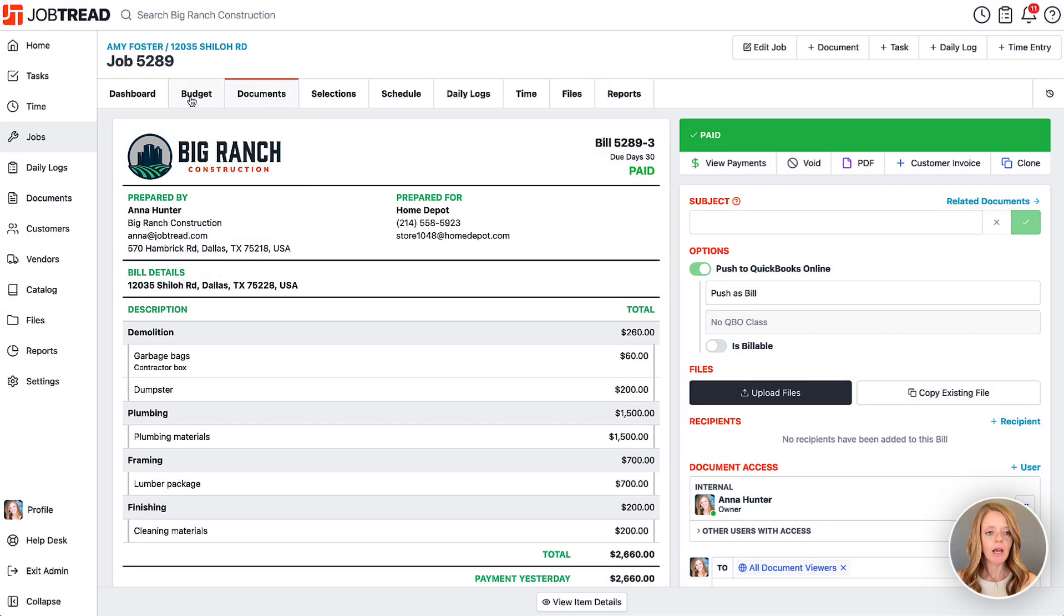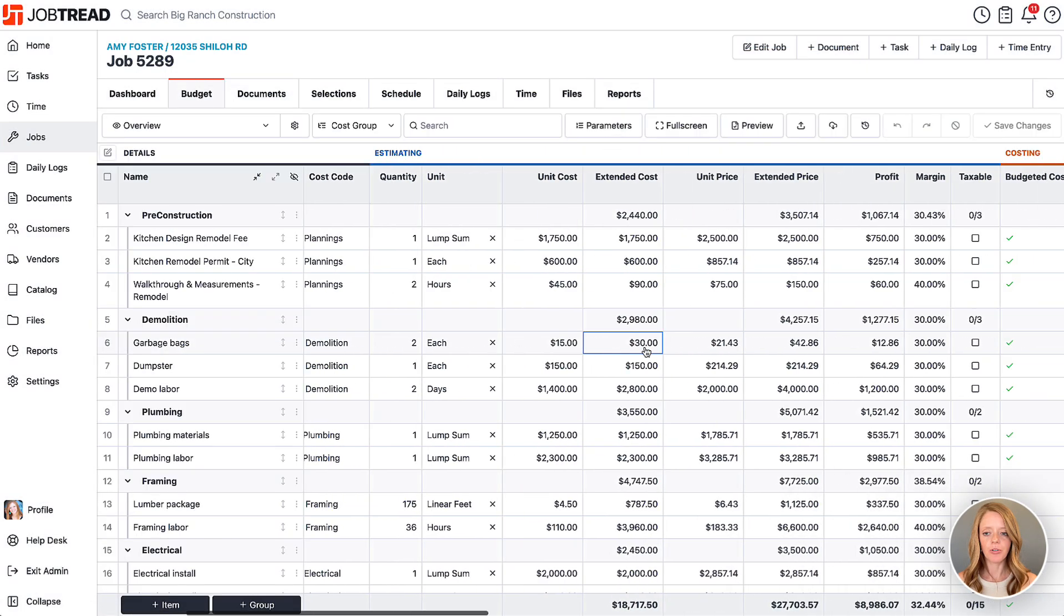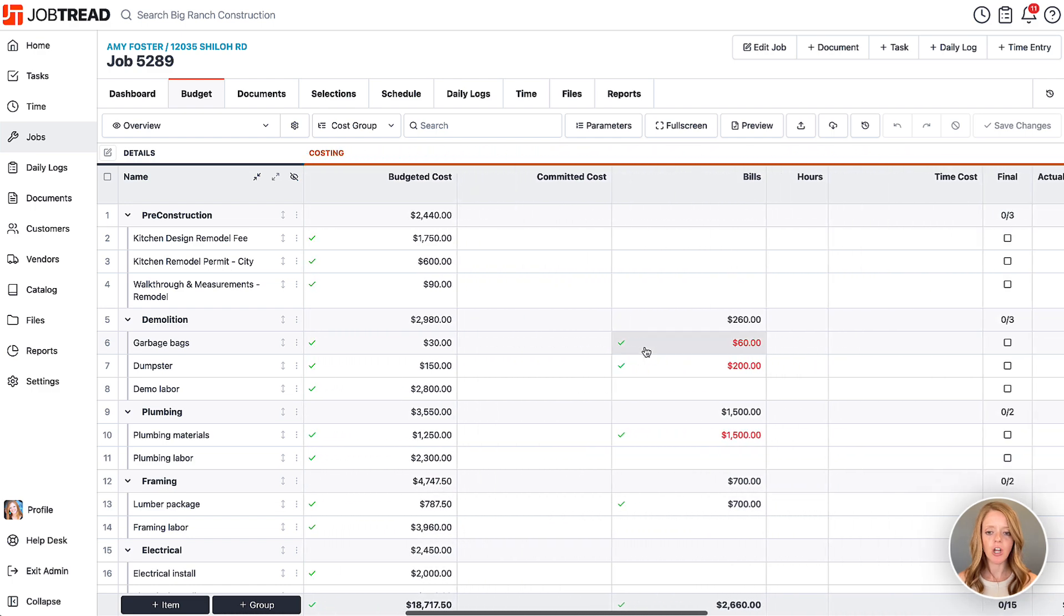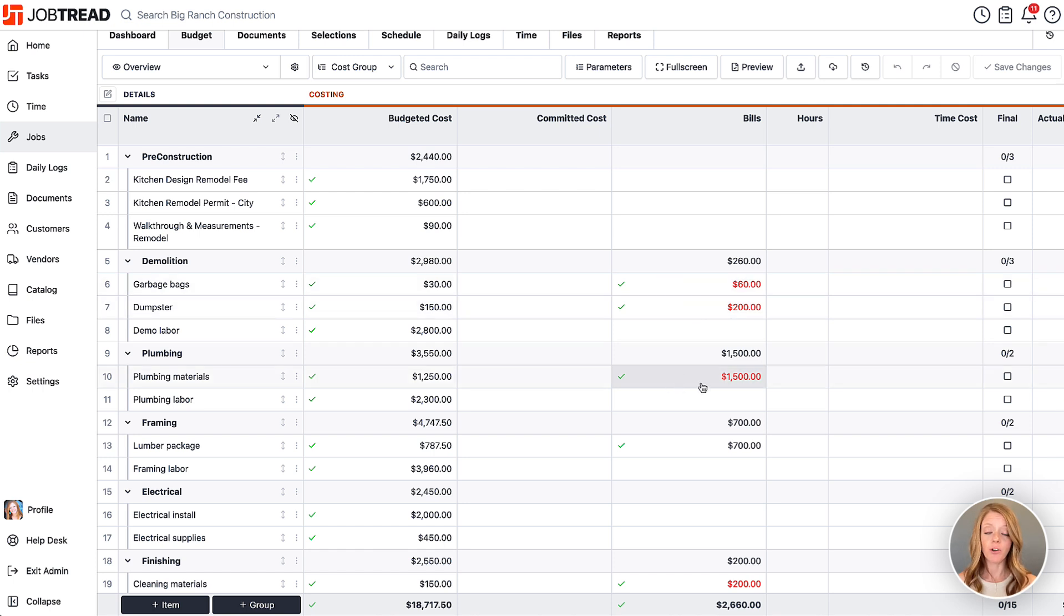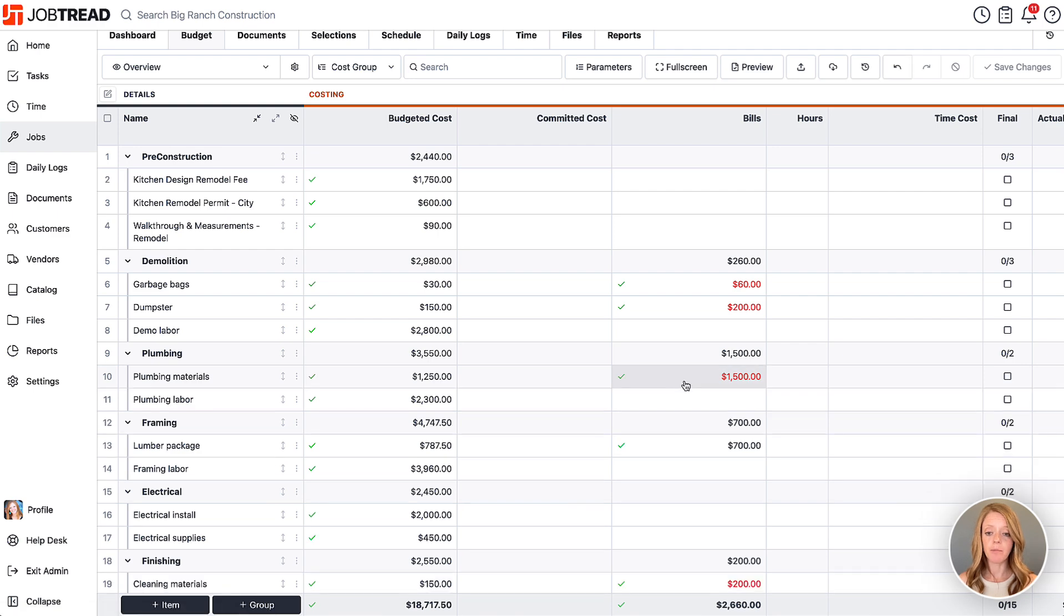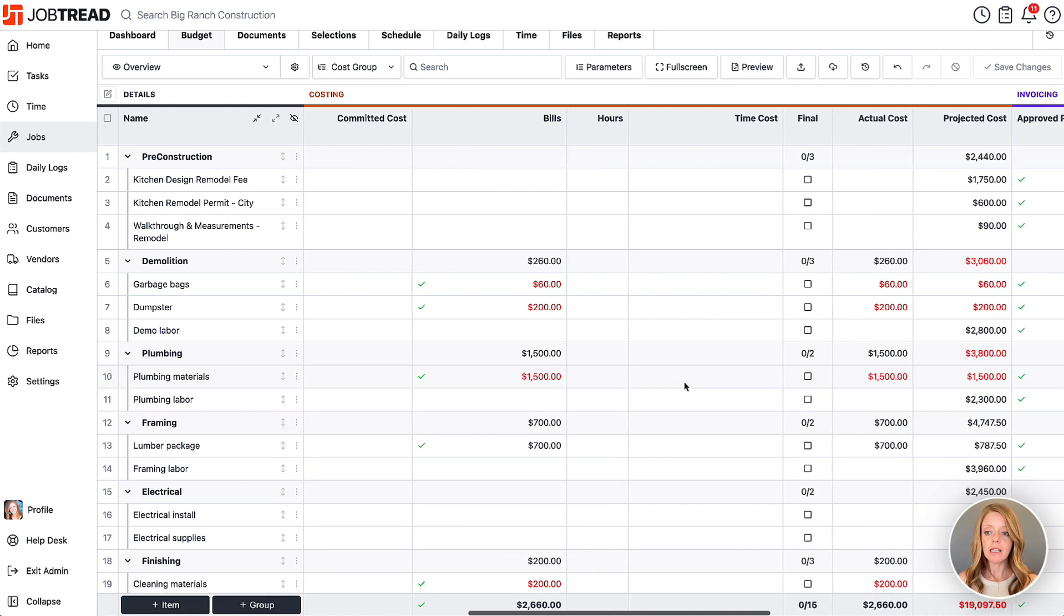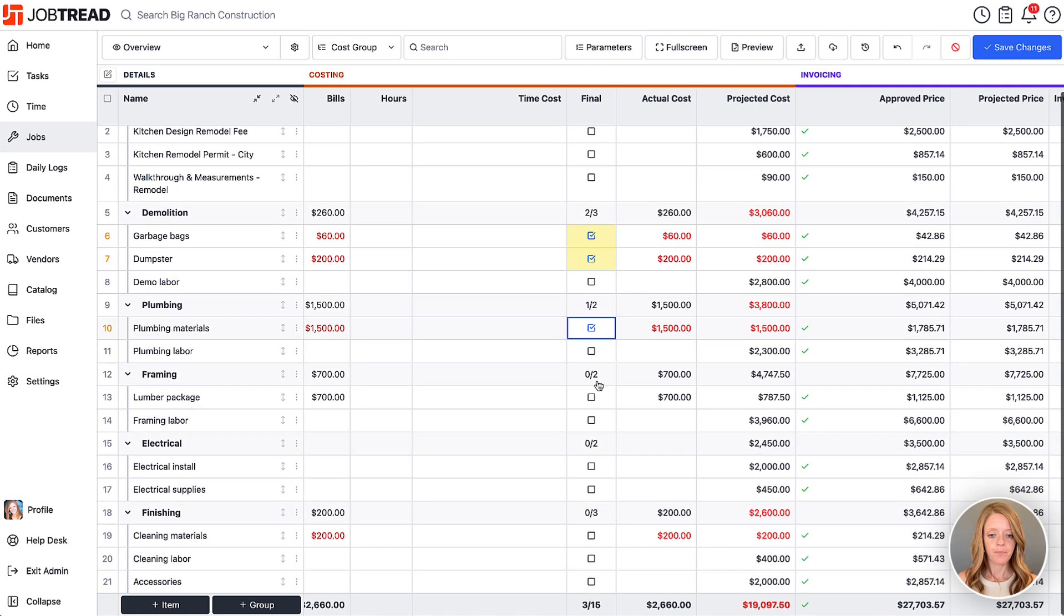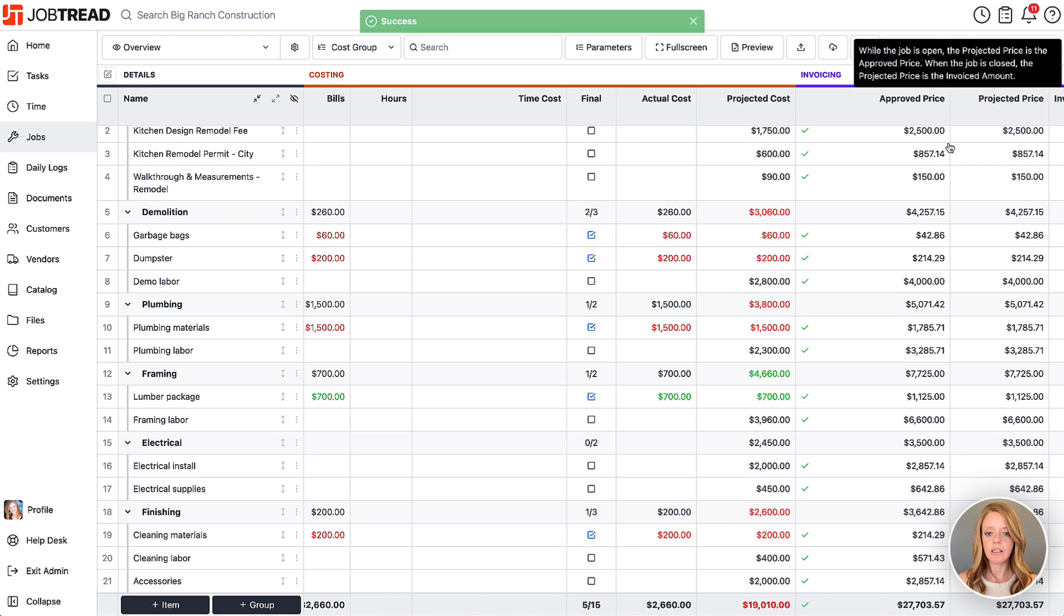Now when I go back to my budget, you'll notice that because this is a fixed price job, we have gone over budget or over budgeted cost for many of these items, so they turned red and therefore they're eating into our profits. As you can see, they're all informed by the bill. Now we can mark those items as final - we're not planning to spend any additional dollars in those lines.